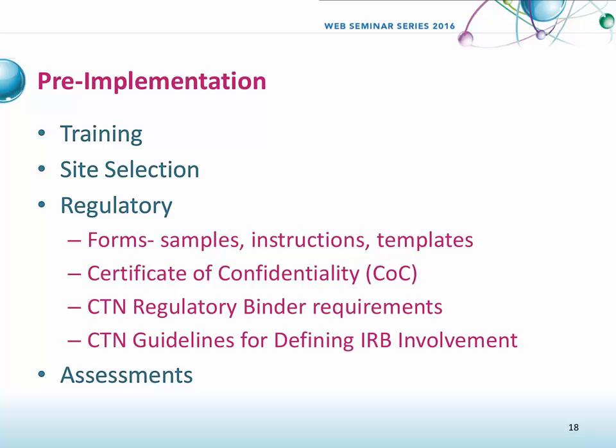For site selection, in that section, the CCC really was trying to develop a document to explain the process that's involved in site selection. This might be different than other organizations or studies that you were part of. We've also provided some examples. While this process is pretty flexible and different teams do it slightly differently, there are certain best practices that we found. There are lessons learned, and there are some examples from other teams that have thought through this, and have prepared meaningful methods of selecting sites. So scoring systems, for example: how would you rank one candidate site against another when you're trying to figure out what the best suited sites are for your trial? Things like that I think are very helpful too.